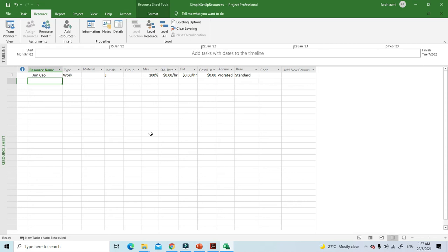Okay. So, equipment resource considerations. In Project, you set up people and equipment resources in exactly the same way. They are both examples of work resources. However, you should be aware of important differences in how you can schedule these two work resources. Most people resources have typical working days of 8 hours, usually not more than 12 hours. But equipment resources might have much more varied capacity for work, ranging from short durations followed by maintenance, to round-the-clock operation without interruption. Moreover, people resources might be flexible in the tasks they can perform, but equipment resources tend to be more specialized.